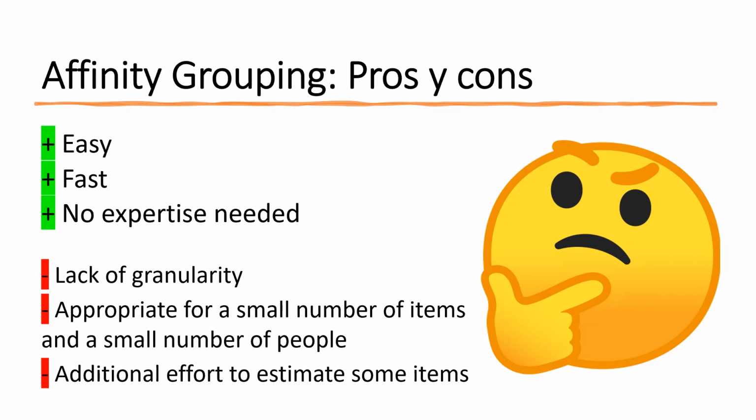Yeah, there might also be some initial project setup that only happens in the beginning of a project, like CI/CD or build pipelines, you name it. And then estimation will improve after that initial phase. The first sprints actually cannot be used at all for baselining, but at some point the team gets in a groove or in a rhythm where things become more predictable and known.